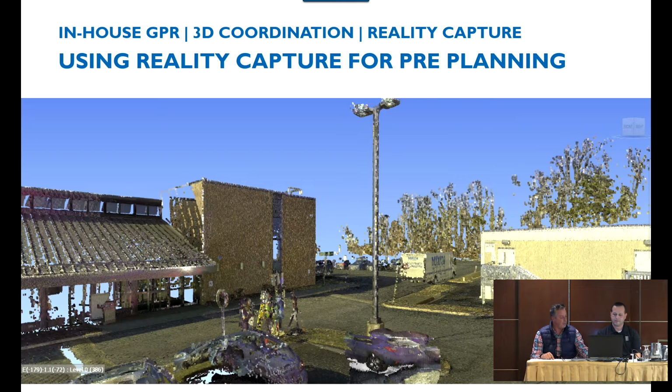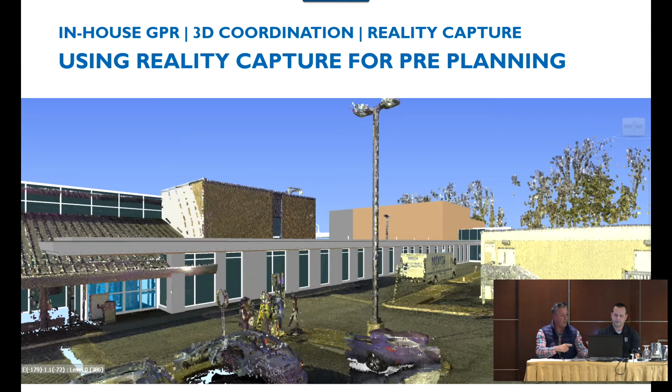And so we locked it in as far as our grids and our coordinations, and we're able to bring in the new building. So we've got the scan. There's the new building that's going to be going into place. But the building over here, this is a modular unit, and this modular unit houses a lot of equipment that can't be disturbed until the new building's done. Well, we have storm drains that need to run through, and we actually have to dodge around this modular unit just temporarily until we get the new building done, and then move everything over.